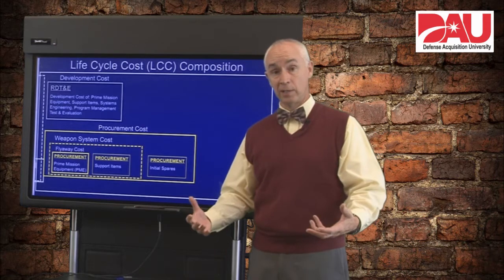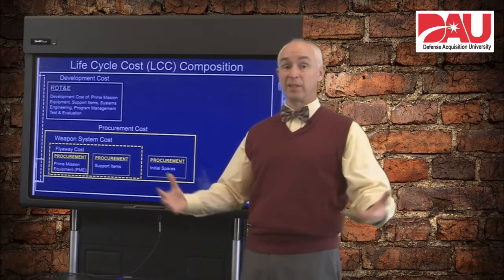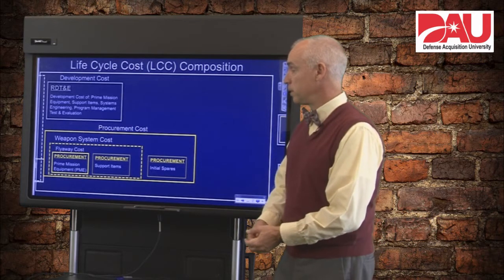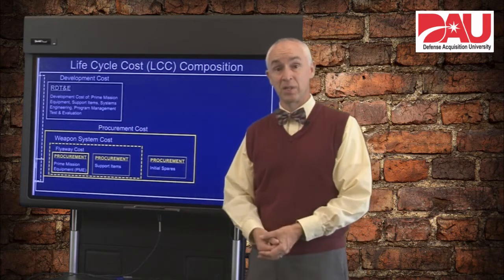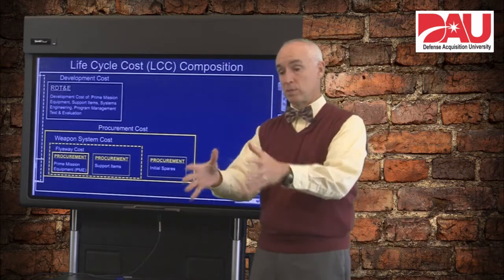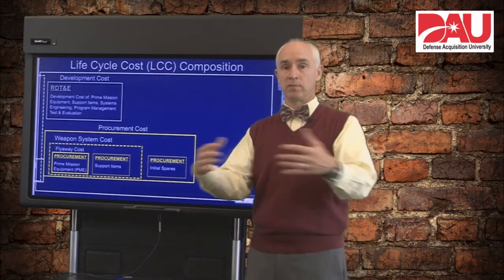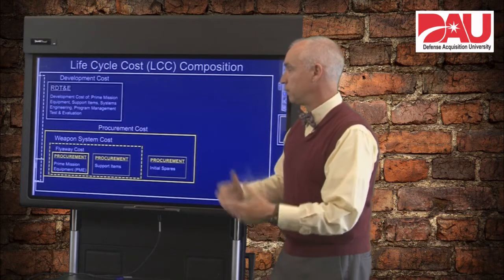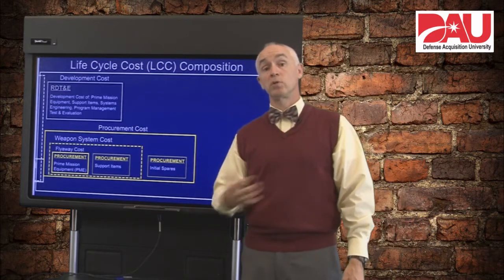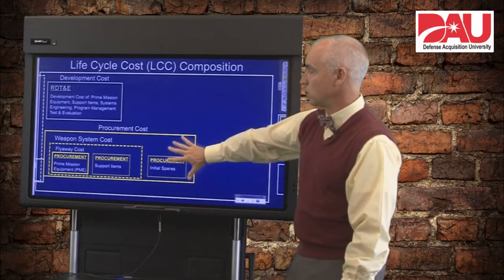So what are those support items? That would be things like your test stands, all of your maintenance gear, generators you have to start an aircraft up, training devices — all of those go into that bucket of support items. All of that together, with all of its support equipment around it, is the weapon system cost. And then to finish off procurement costs, you also have to buy your initial set of spares, which is also bought with the procurement appropriation. So that's all your procurement costs.